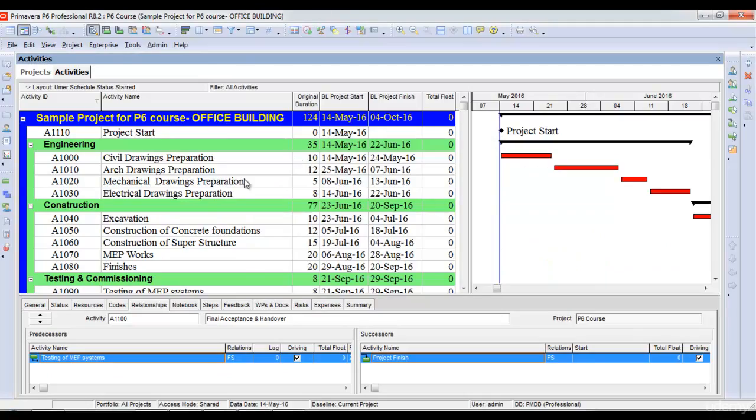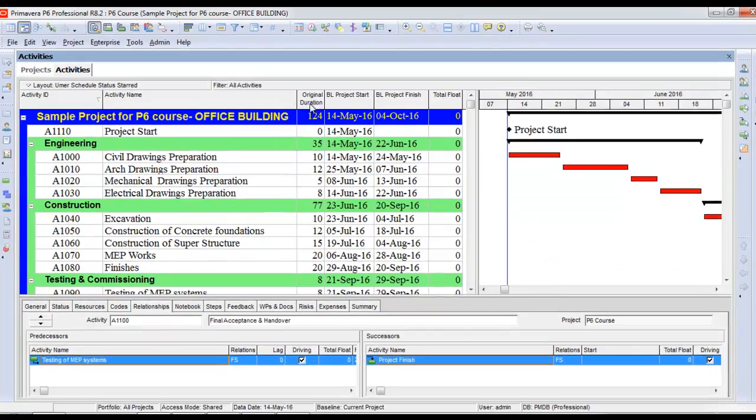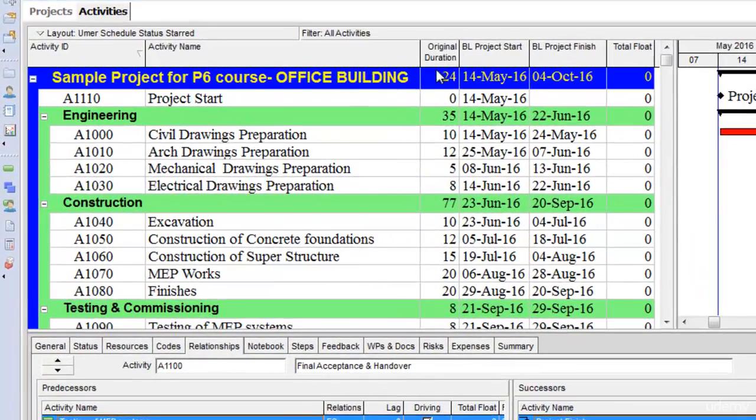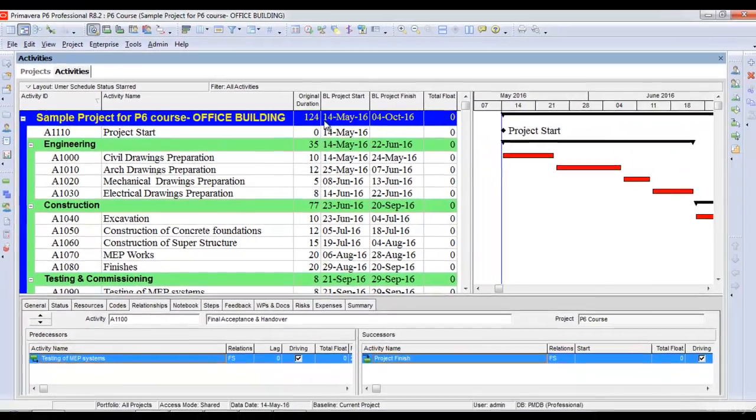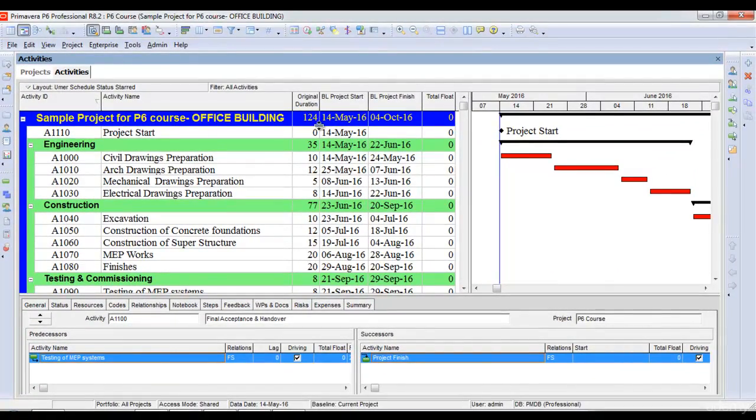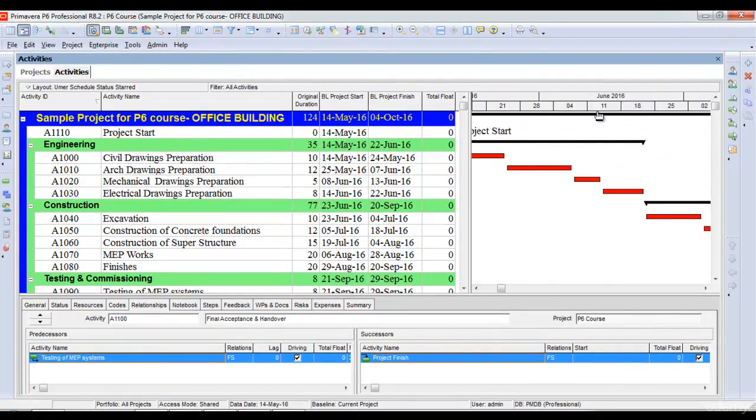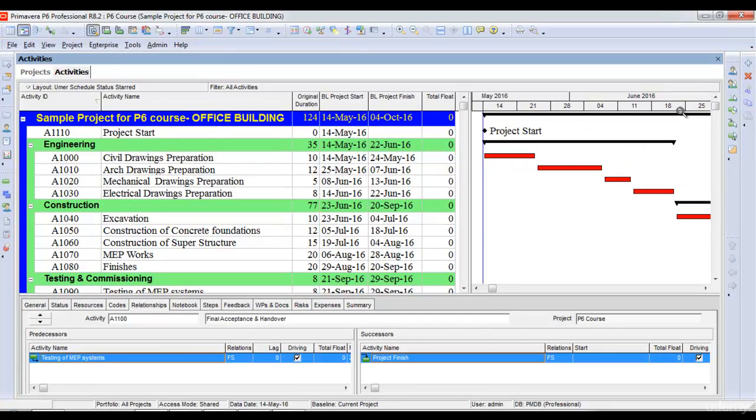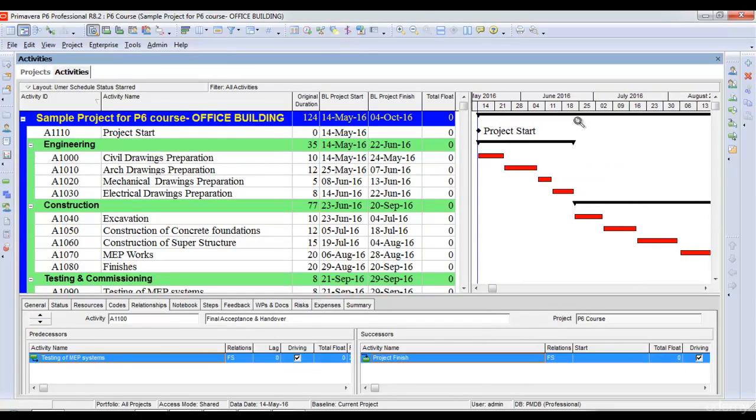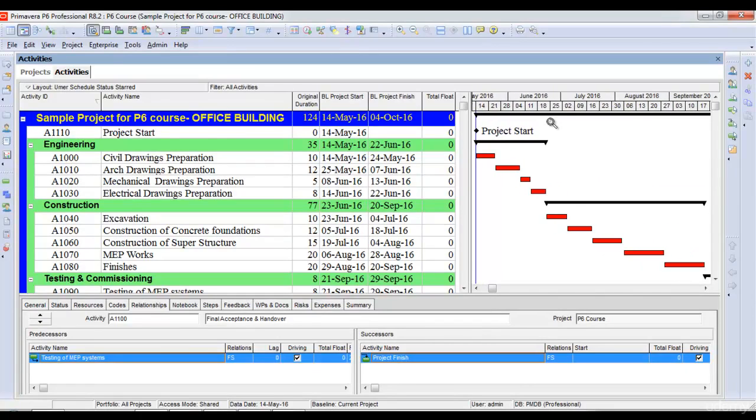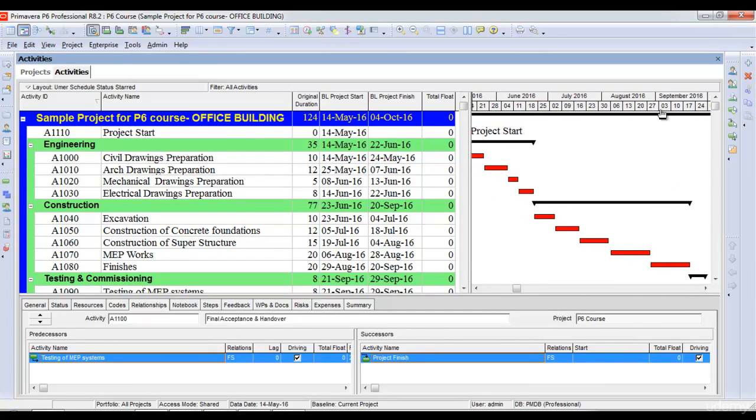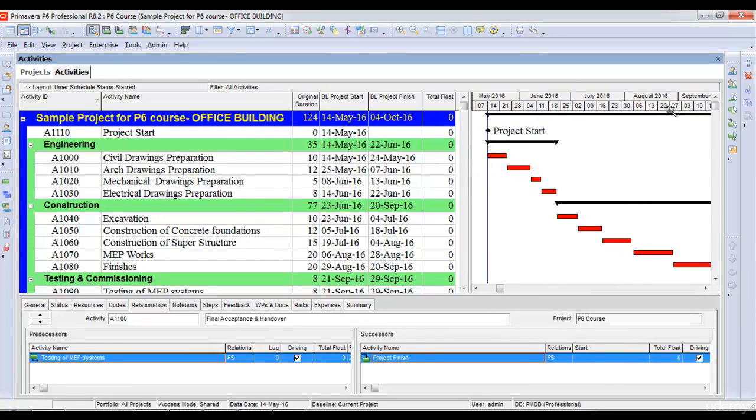Once I click schedule, you can see the total project duration is 124 days. Remember, this is 124 working days and doesn't include non-working days. As you can see, my project has a start and end, and all activities are in red, which means all activities are critical.